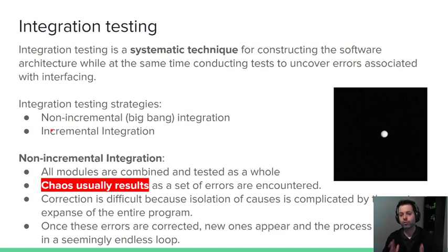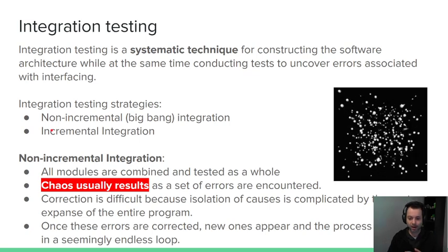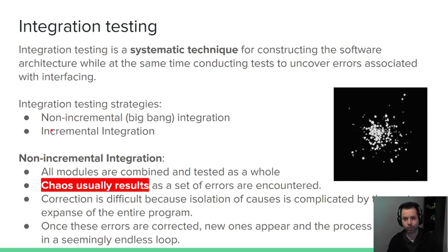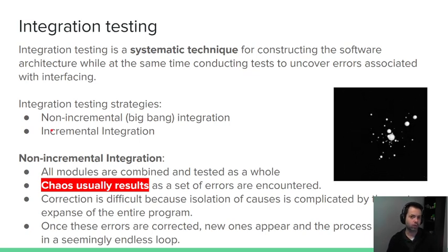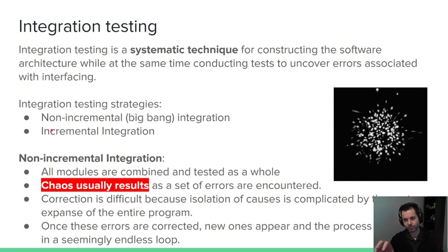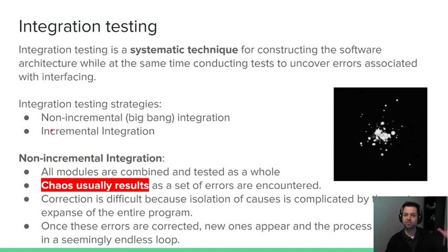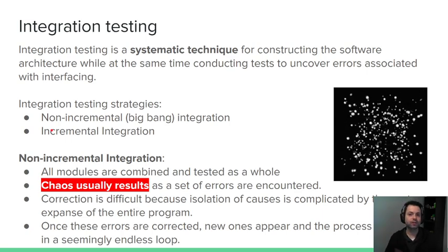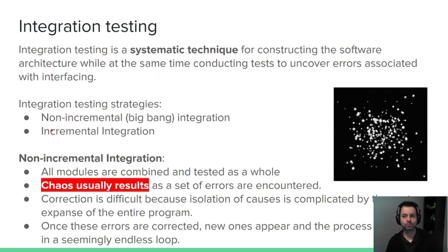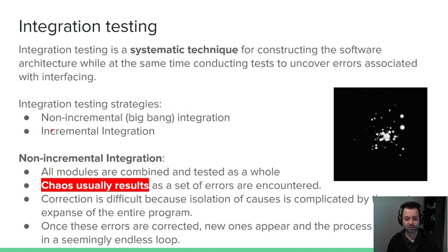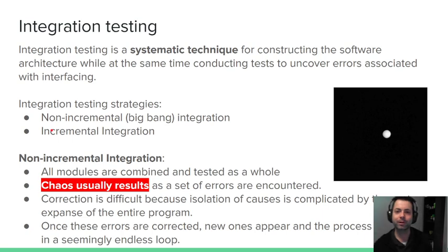Whereas if you bring everybody's modules together at the same time, it's often really hard to figure out what's going wrong in localized things, right? Because if you zone in on one particular problem and you correct it, that may introduce a slew of other problems elsewhere that you did not intentionally cause. And you get this ballooning effect that may happen with just testing everything all at once. It can become a horrible feedback loop and it will become very frustrating for all of you.